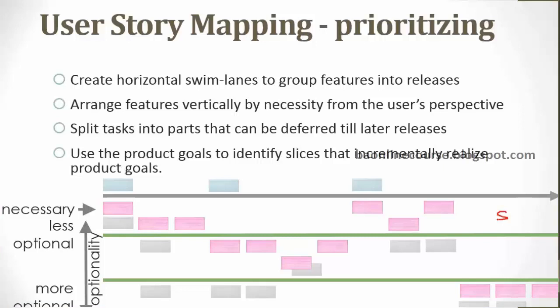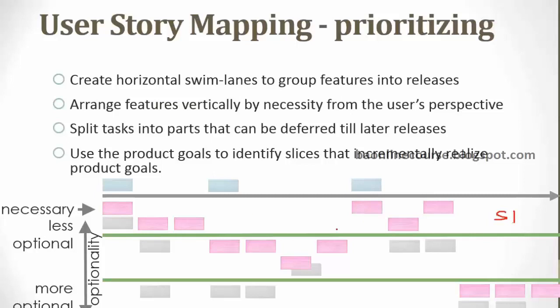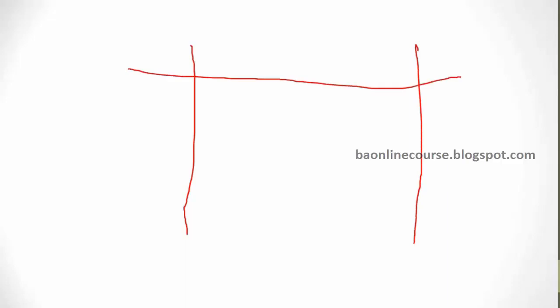So now clearly you'll have this list of 7-8 features that you have identified. Let's say this is sprint 1, and 4, 5, 6, 7 features are there. Ideally your dashboard or your whiteboard in the room where your project is being executed would have something like this: to start, work in progress, and completed.